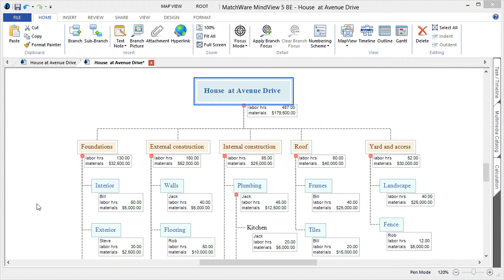We've now created a very detailed and descriptive work breakdown structure, listing the individual deliverables, the work packet items, grouped the corresponding tasks into sections. We did an estimation on labor hours and materials, totaled up those values to the parent branches and up to the main root, and we even did resource allocation on the tasks.